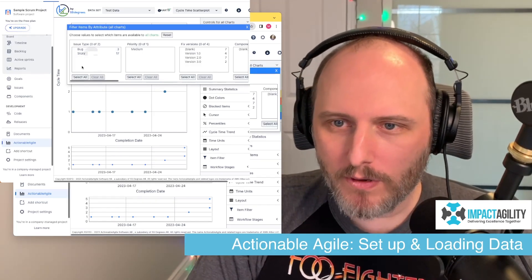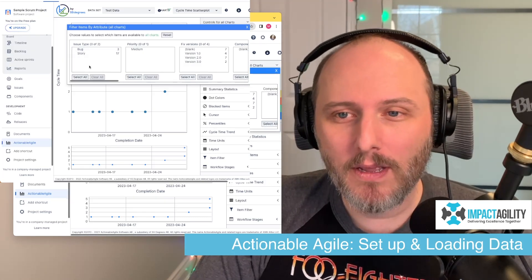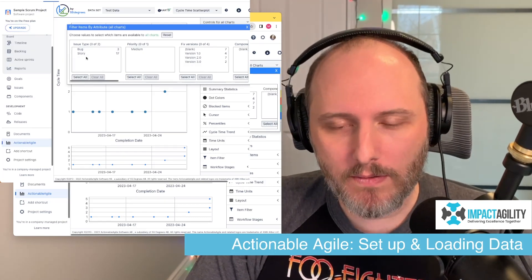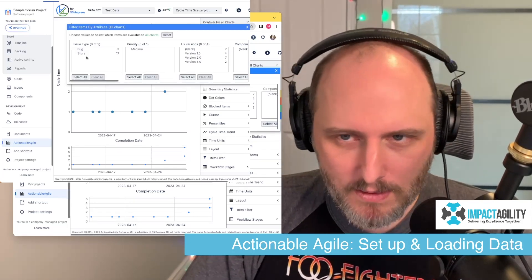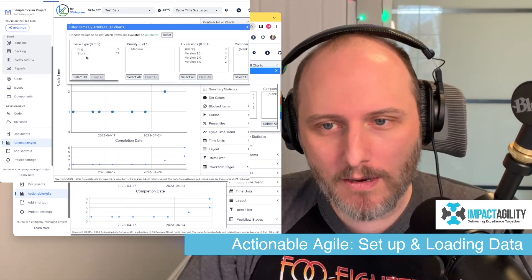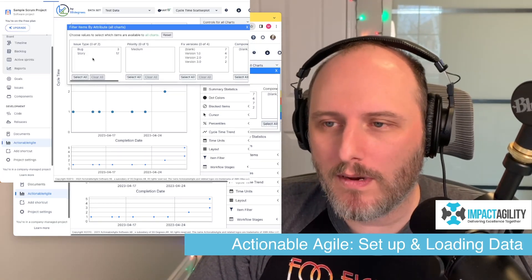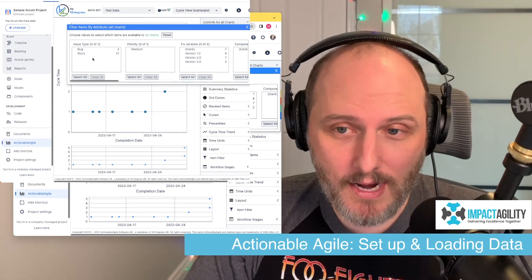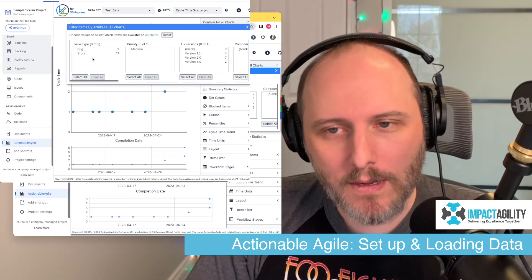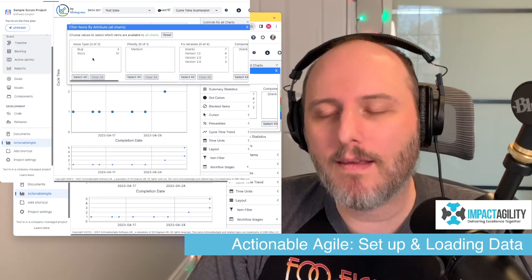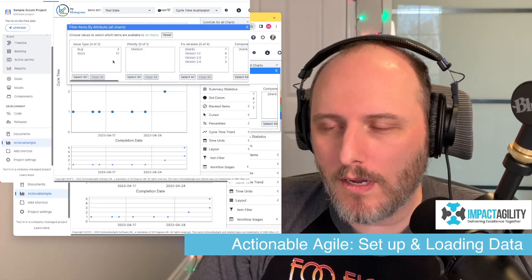Another thing to watch out for is if your team or organization is using epics in Jira — you might want to filter those out. Your epic cycle time is going to be longer than a story's, and it's going to skew your data. So you'd want to deselect epics in the issue type filter. Conversely, you might also want to look at the data only for your epics, since there's some interesting analysis you can do there — just select epics in that case.